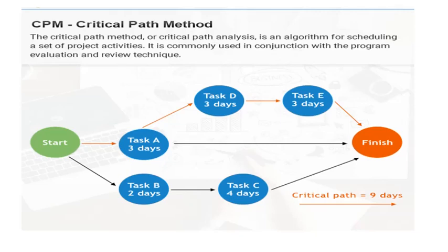have to be performed. So activities would be selecting a location, cleaning the area from trash, buy paint for marking. Then the next activity would be measure the area for a certain number of cars, then mark and paint all the parking elements, and lastly to install the gate, right? So these are the activities that we need to perform in order to organize a parking lot. Clear? So we have enlisted and identified what all activities that we need to perform.